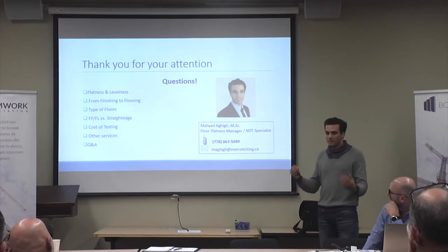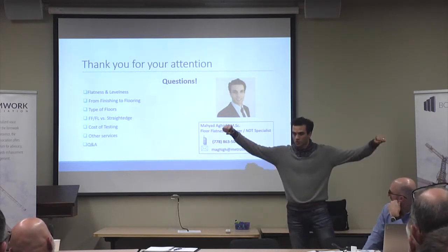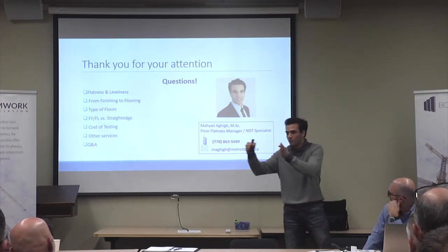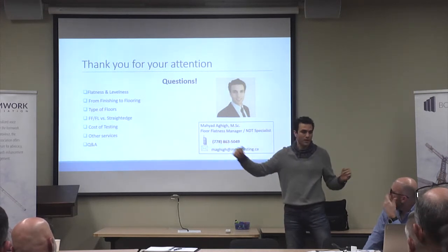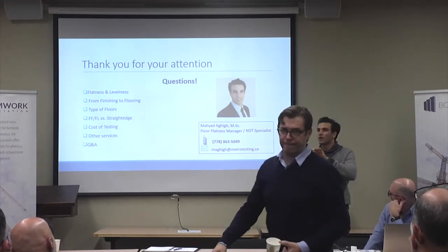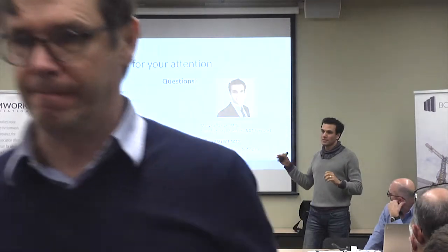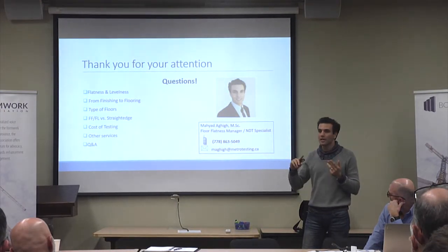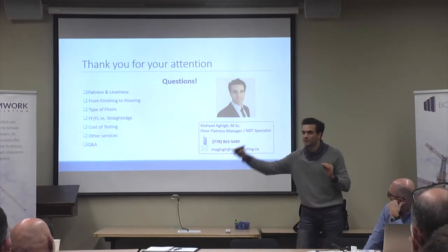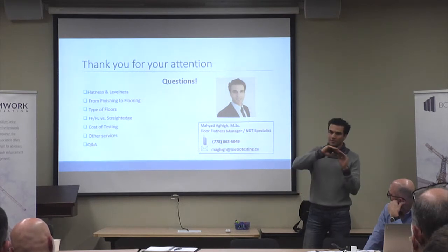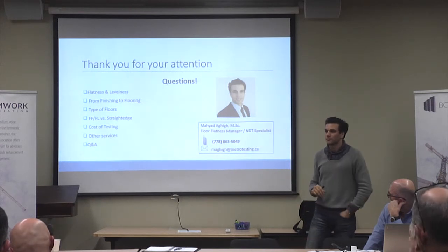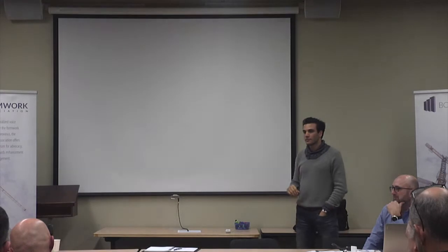The dipstick method, the difference is that the straight edge is 3 meters long, you just put it there and then it's going to rock back and forth. Dipstick is 1 foot. So it's going to go and then come back down over 3 meters or so. Basically, the good thing about the FFL number is that FF and FL are separate numbers. And CSA specifically says that for cambered slab, FL does not apply. So I can't fail you if you don't meet FL, because it's going to be a low FL because of the camber. So FF is basically the smoothness of this cambered slab, and that's something that you should achieve. Does your dipstick measure the camber or just the FF?